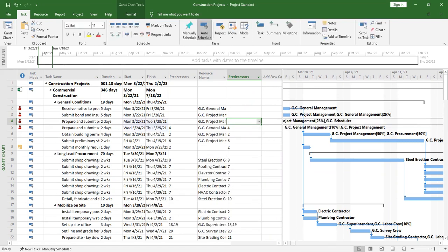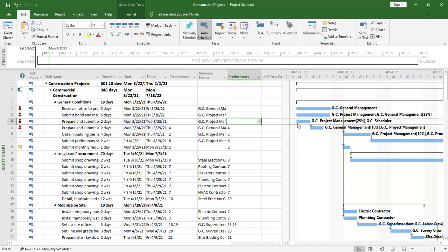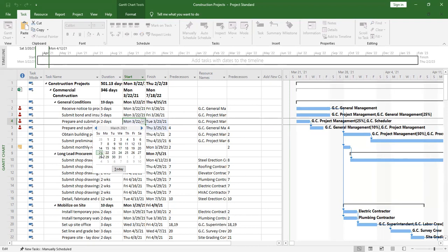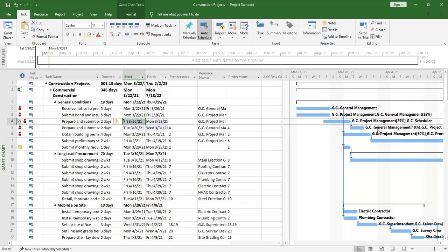The predecessor will go, and now you're free to schedule it on any start date, because now it comes back to the start of the project. So when you push it forward, instead of starting today, it's going to start in 2060. It's going to affect the other ones that depend on it.